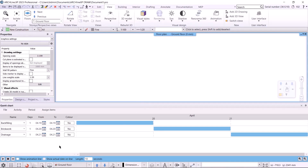The animation bar consists of several parts. By default, three rows are created for each new project, which can be modified, deleted, or additional rows can be added. The rows represent activities and are already named: backfilling, brickwork, and drainage.